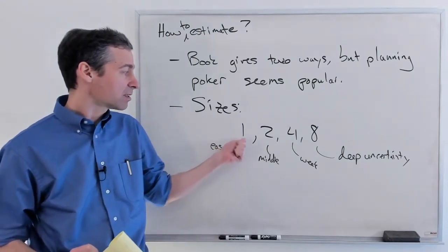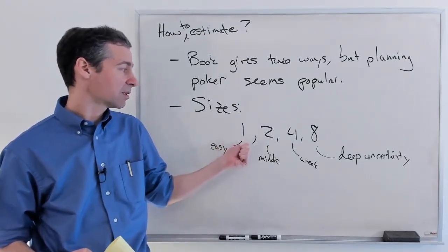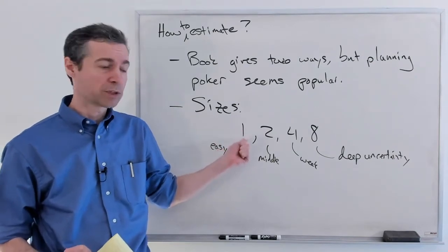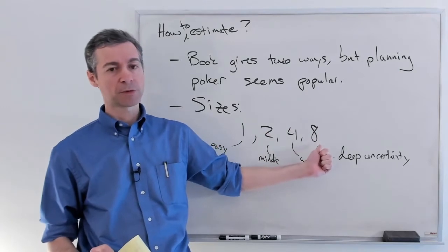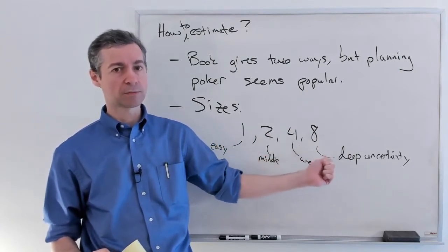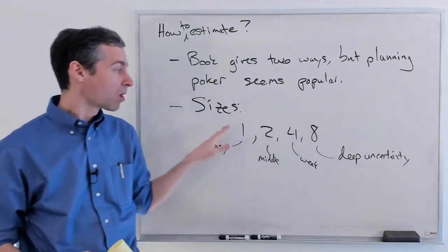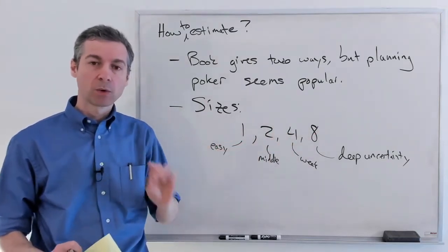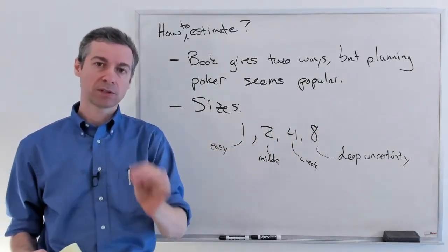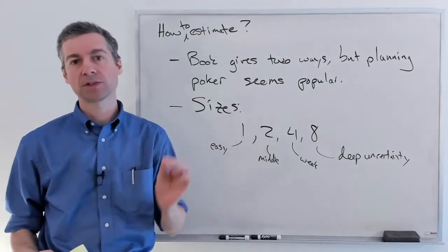Again, the idea is the team is going to get a sense of, oh, these are our 1 stories, our 2 stories, our 4 stories, and oh, we came up with some 8 or greater stories. We have to break them up. Okay. How much time those points really take will change for every single team. It will be different for every single team.